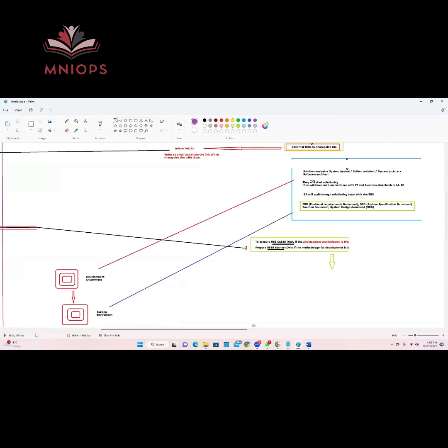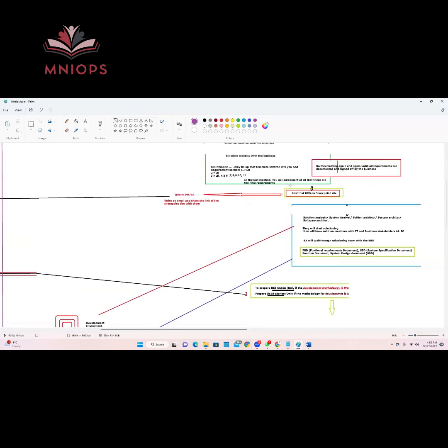And then when the development is complete, testing starts. A lot of defects they will find, so you participate in those meetings, ensuring that they are testing all the requirements that are there in your requirement document. So you also keep a traceability matrix, which means that from the requirement to solution to development to testing, there is a one-to-one relationship in those items, so that you can trace that each requirement is being developed and tested.